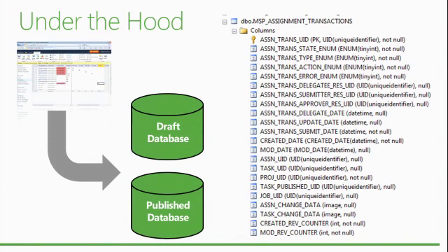For the task update, though, it's tougher because you don't have a lot of information in a reporting database. Actually, you have none. You don't know where the task update is in the process. You don't know what happened to it. You don't know if it has been approved or things like that. You can only deduce these things from what comes out at the other end, that is the reporting database. If it's not there, then what happened to it?